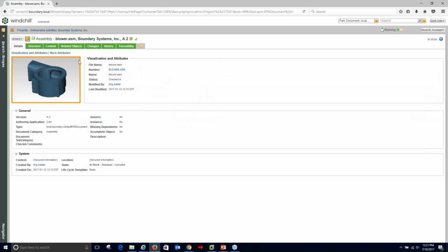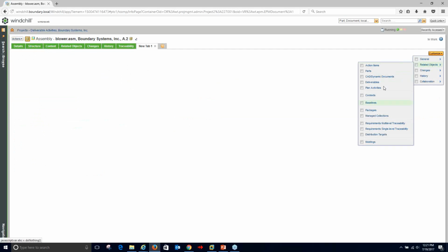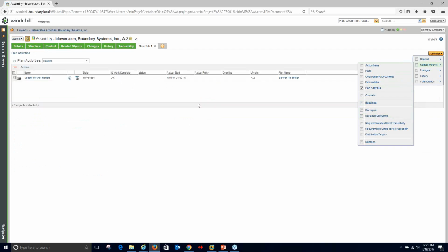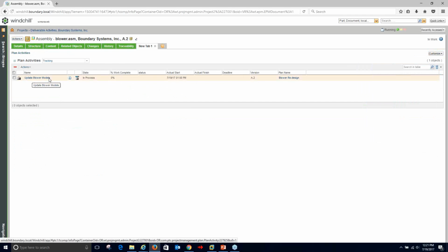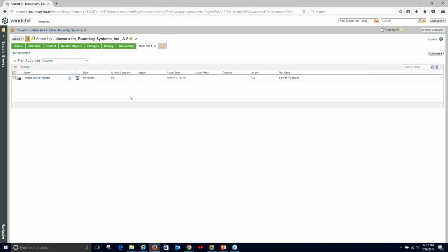I can make my changes to it. And then, as I do that, I don't have this added in here yet. But as I do that, then I can also come in, let's say I made some changes to this, right from here, I can say, okay, I did 3 hours of work on this just now. And so now that's going to update my completion percentage to 8%, and that's going to roll back up to the plan. So that's kind of nice.